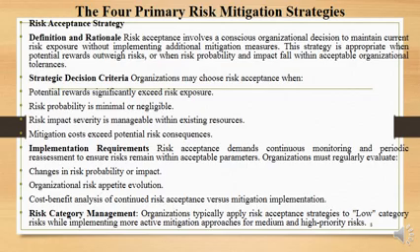An organization may choose risk acceptance when potential rewards significantly exceed risk exposure, risk probability is minimal or negligible, risk impact severity is manageable within existing resources, or mitigation cost exceeds potential risk consequences.